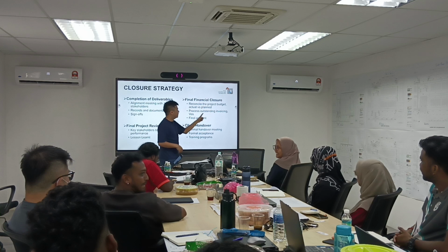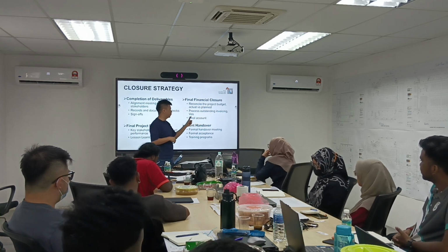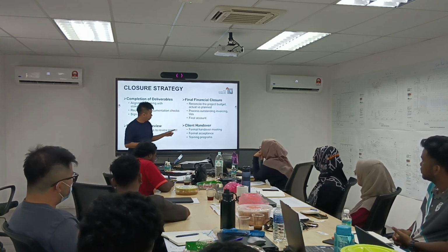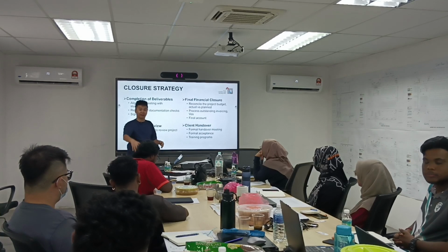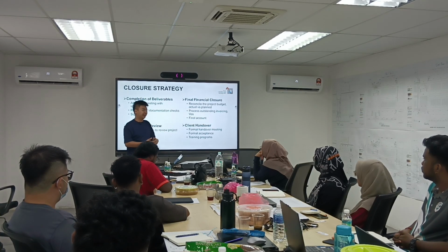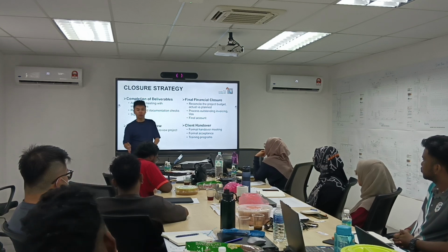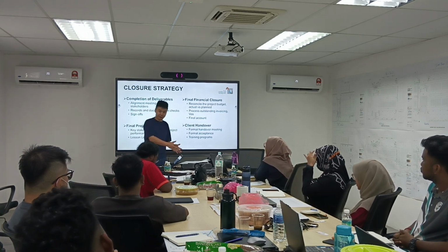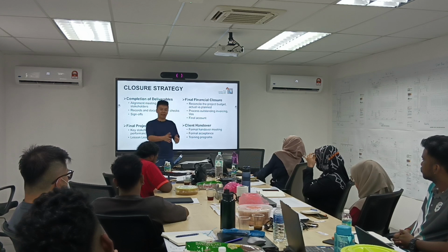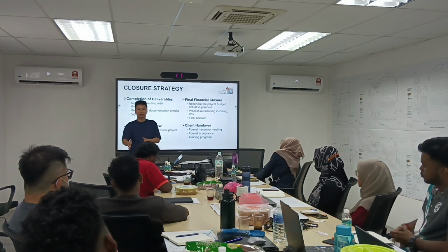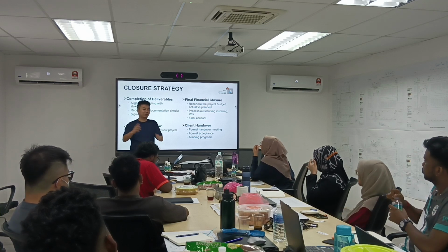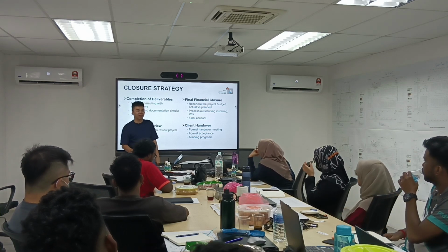Make more money for the company means you have more bonus lah. Okay, so processes to outstanding invoicing and VOs. This one, just now you guys also asked. Always in a project, especially in other parts of the market, you always hear contractors say they are not paying my VOs. Because there is a culture in Malaysia where VOs happen in the projects, there's no documentation, no AI, no EI, no PMI, no SI, and they go on with the work. Then 6-7 months down the road, suddenly you come back: hey, previously I did that one, you know it's a VO, I want to charge you.